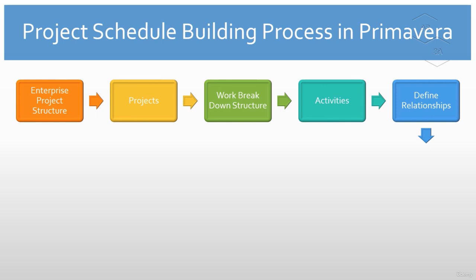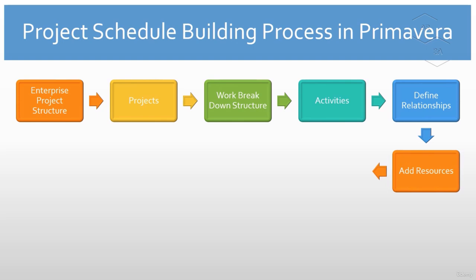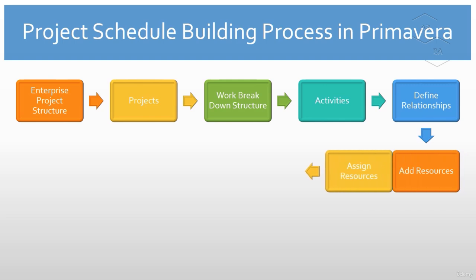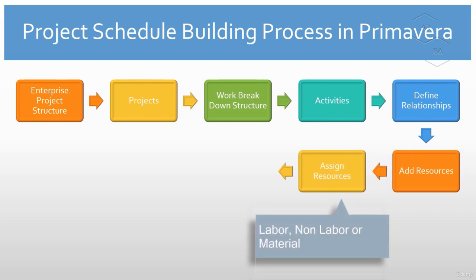Please note that we will explain the activity relationship types in a separate lesson. In order to complete the work for the project activities or tasks, we will create and add resources in the Primavera P6 database for these project activities. Then we will assign these resources to the project activities. A resource type can be referred to as a labor, non-labor, or a material resource.